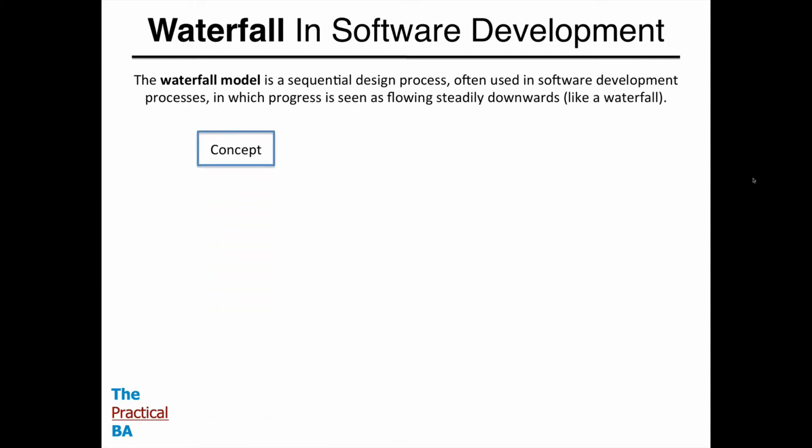So very often the very first phase is a concept. So you're doing the most basic documentation, presentations to get approval to go to the very next phase, which would be your plan. So if the concept is not good enough to expend the resources and time to plan it, then the concept would end at that point in time or be mothballed, if you will, until it can be elaborated further.